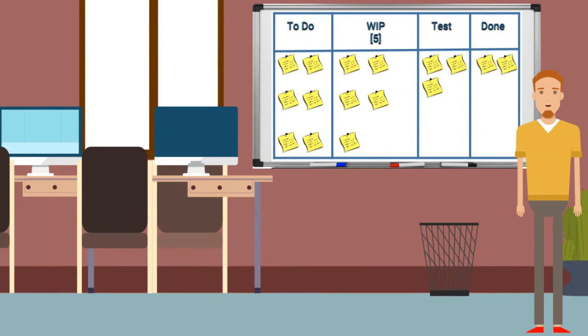Remember, in Agile, the status of a story is binary. It's either done or not done. So this pattern was not very agile and it caused us problems. It impacted feedback during the 1st and 2nd sprint reviews for a release because we had a lot of stories in progress, but you only review done stories.